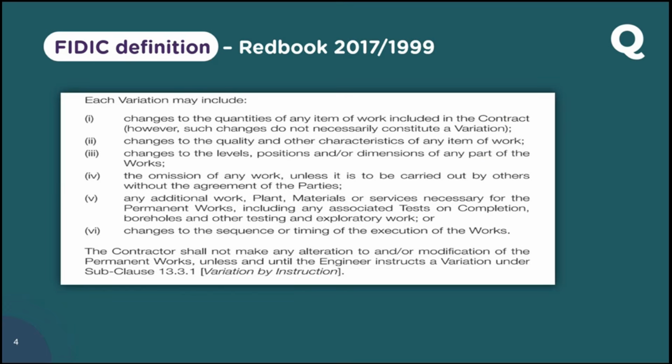So you plan everything based on block A first. You do up to the substructure, because initially what you do is the foundation and initial ground improvement work. So what you planned was for block A, you will do the ground improvement and all the foundation, then that equipment you will move to block B. Now he's telling, no, I need block A and block B to start simultaneously. That literally means you need to add extra resources and equipment for that.